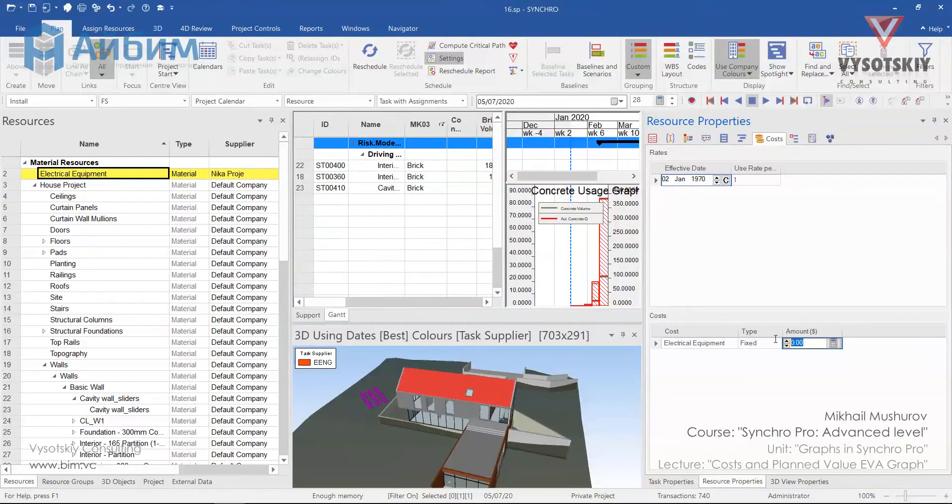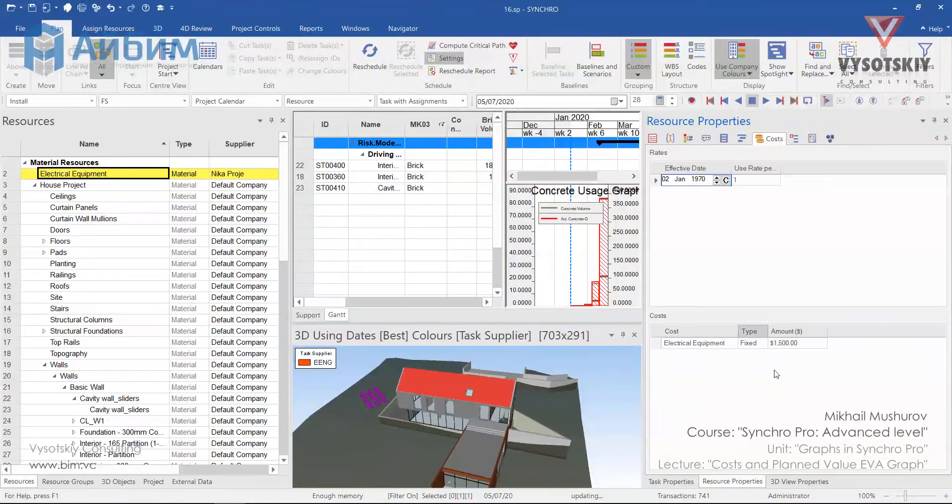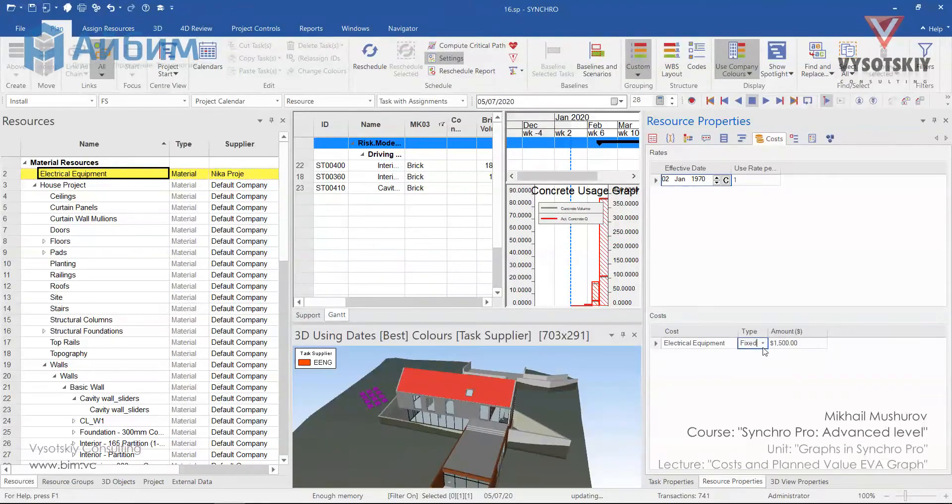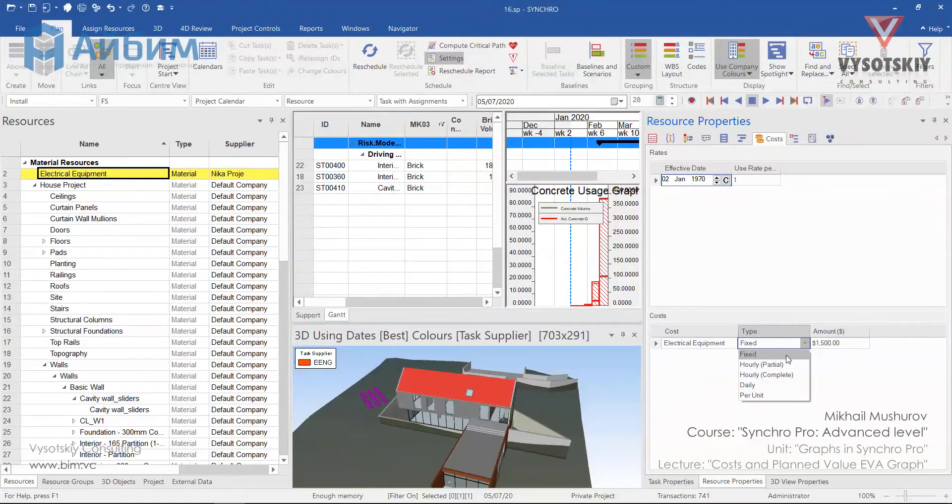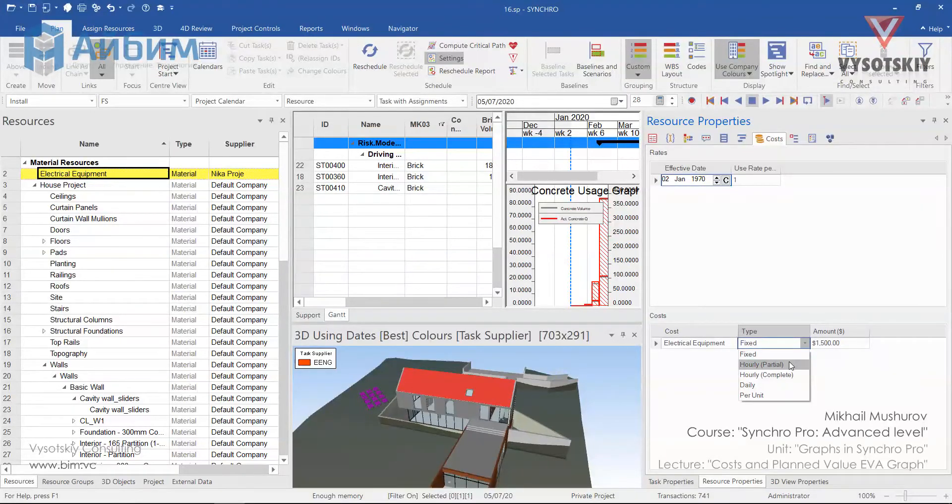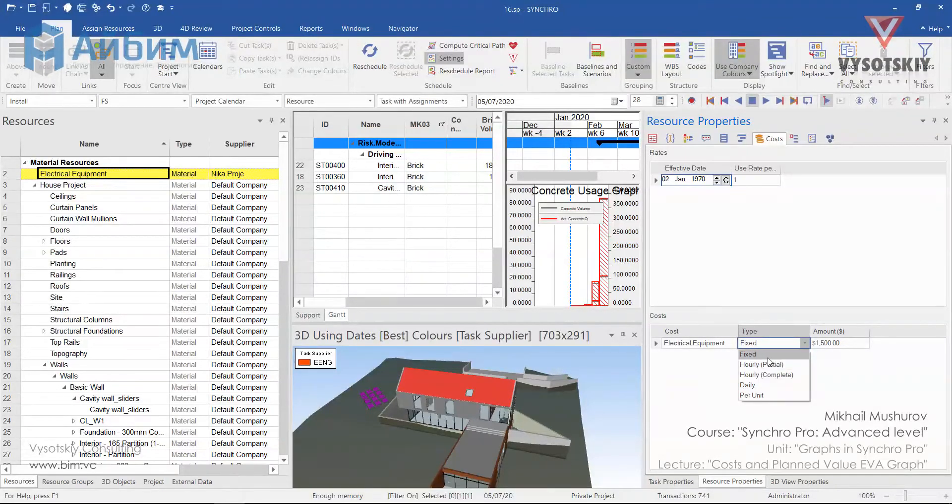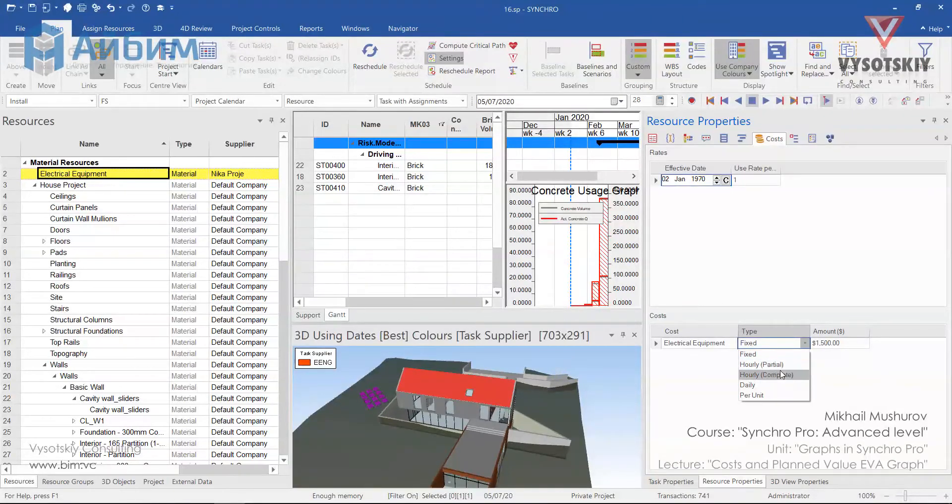Let's say it's 1500 US dollars. We can change the cost type from the drop down next to the fixed. Let's see the options. We have fixed price, we have hourly partial, hourly complete. So the difference between these two is, for hourly partial, fraction of hours based on the minutes spent included in the cost calculation.